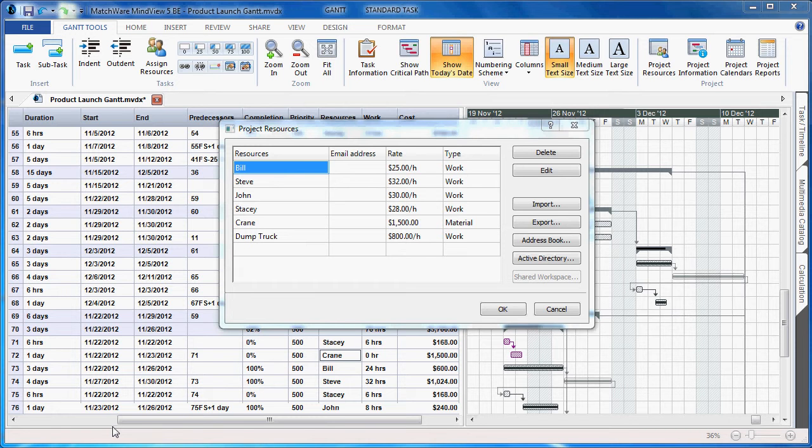In addition to human resources, MindView 5 supports material resources that you need to carry out the project. Associating a unit cost to material resources lets you track the overall cost of your project and human as well as material resources.